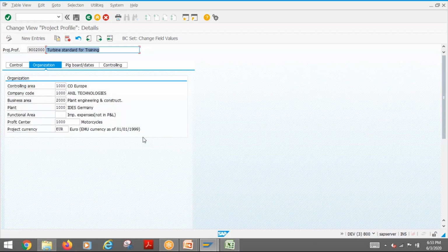But the problem is that we need to check with finance whether they agree or not. Sometimes they will say no, we don't need cross postings in one project. They want the reporting project by company code. Then in that case we go with company code wise. Sometimes even plant wise, because in some firms a plant acts like a company. Even though they are plants, all their operations are related to that plant. We can say that a branch kind of concept will also be there.